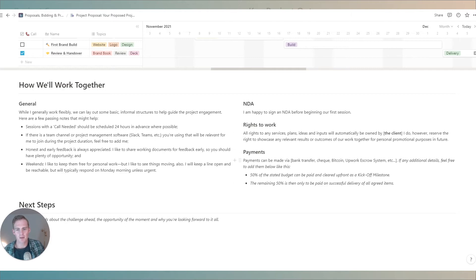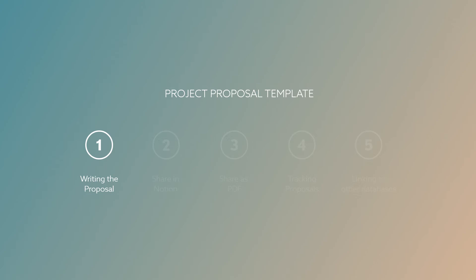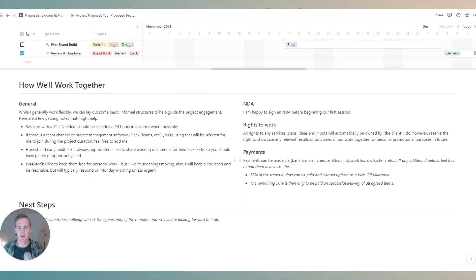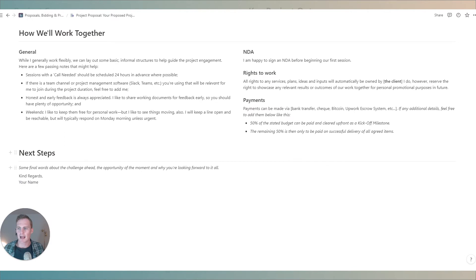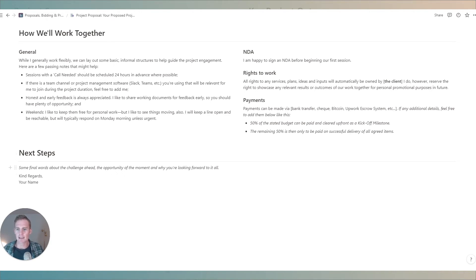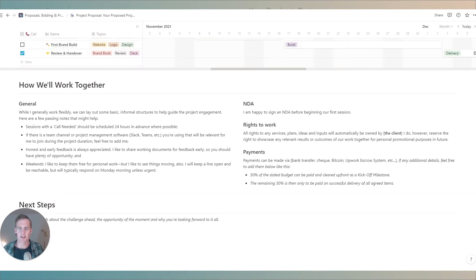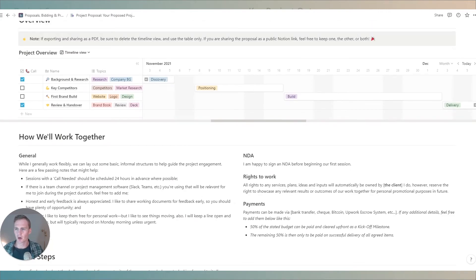And payments you want to be clear about exactly how clients can pay, when they will pay, any divisions if it's fully upfront, 50% upfront, whatever your model happens to be. And we will conclude by giving perhaps some final words about the project that we're about to embark on together and any next steps that they need to know to go forward.